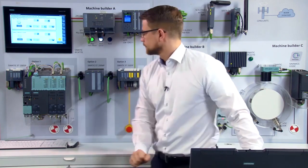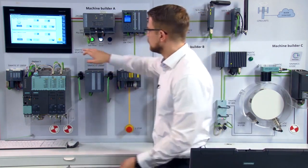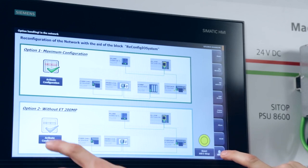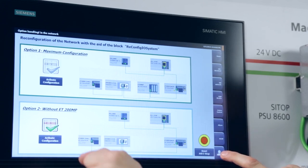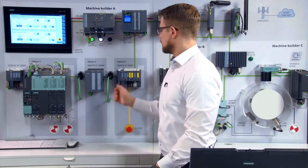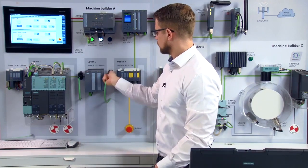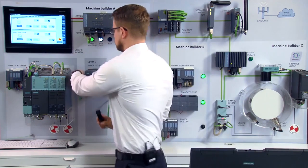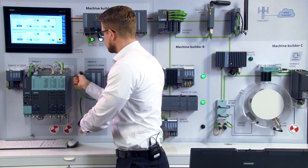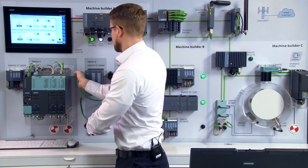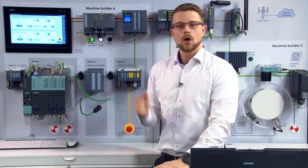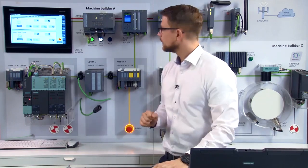During commissioning, it's important to remove the material infeed. In this case, the ET200MP, according to customer wishes. To do this, I select the associated option. Do some rewiring to bypass the ET200MP and repeat the safety acknowledgement process.